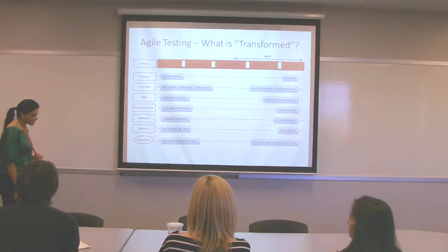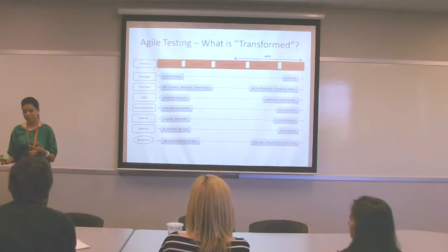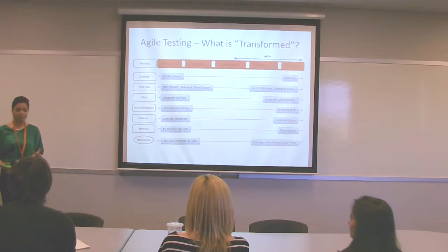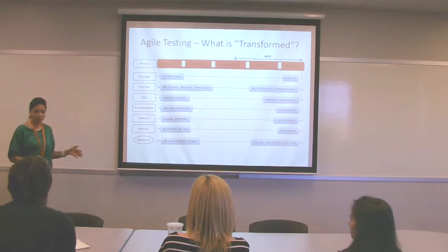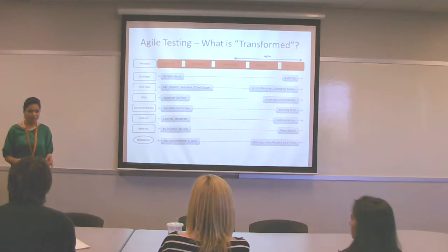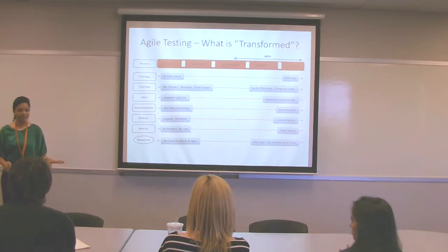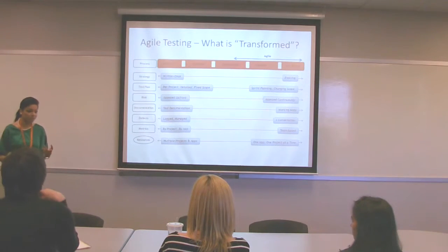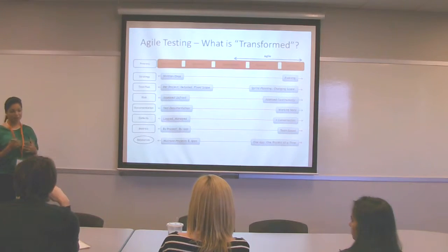One of the clients that I worked at, I still remember that I had to show my frustration to the development team, to the whole team, to the Scrum Master, that even if it is a hallway conversation with a business owner or one of the business representatives where you are discussing a feature, you need to say, hold on, let's call a 15-minute meeting, a quick meeting, and have the tester there as well. So we created something called the 3-person rule that Lisa and Janet, the book that I talked about, have explained a little bit more, but it really helps.